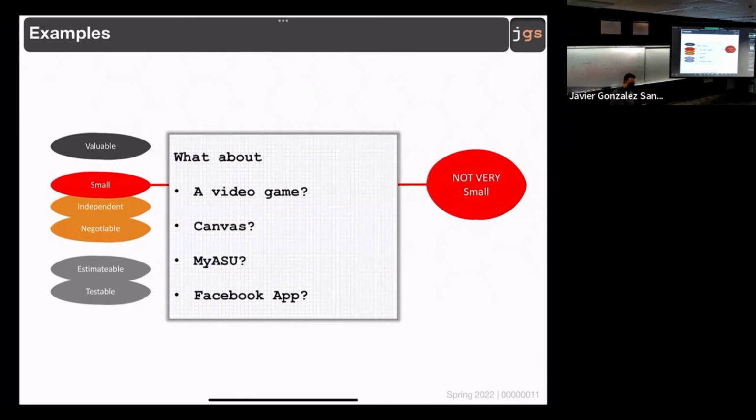For the plan base, the only thing that we need is the requirement for the contract. We don't care about the activities, but it is the next thing that we're going to do for each requirement, which are the activities. So you can imagine that moving the Pac-Man, what I described is all these activities that are involved. Read the keyword, calculate an exposition, draw the animation, and so on.